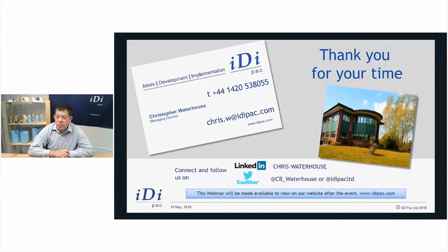Okay, so this was an example where we did some 3D printing, large-scale 3D printing, where we made some packs. We'd done the CAD designs, we'd done the development designs. We thought everything was fine and dandy, but there were a number of features in these packs that the client wanted to test. It was actually quite a large container. We wanted to check rinsing, dispensing, those sorts of features before committing to initial molds. We actually used the containers, filled them with liquid, dispensed with them, carried them, moved them about, and out of that we created an environment where we were able to evaluate with the customer base, on a small scale test. They gave us some great feedback, and those features were incorporated into the designs where we could, and that gave us a huge product improvement in a short lead time.